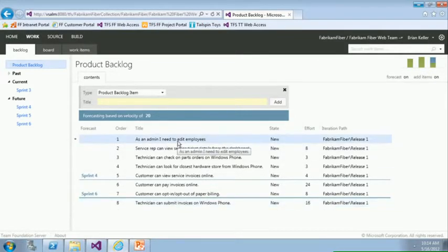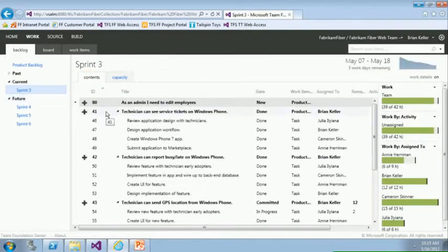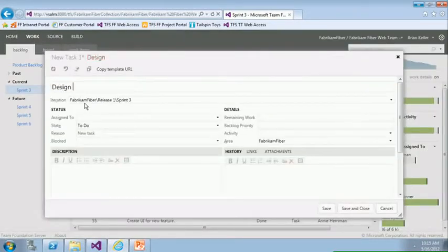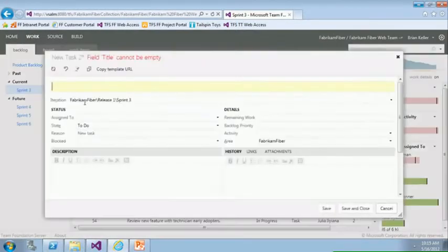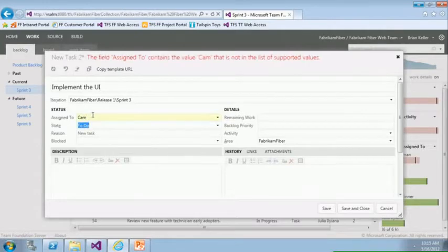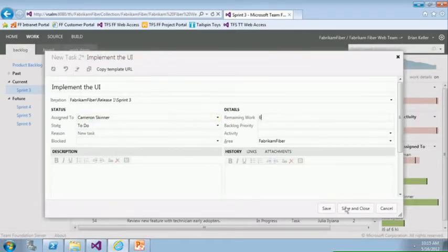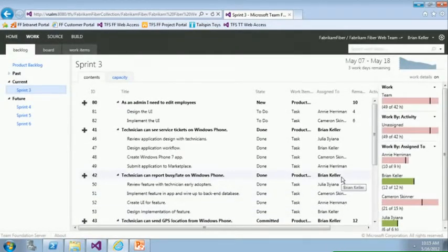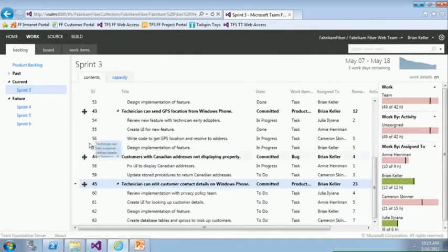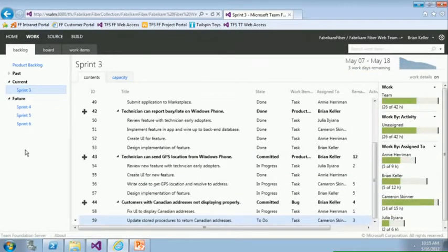I'll do what you're never supposed to do, which is add this to an in-flight sprint. Coming back to this sprint, we can see how individual product backlog items break down into the individual tasks required to do the work. I'll break down this new requirement into two capabilities: one is design the UI — we'll ask Annie to do that, say it will take four hours. The next is to implement the UI — we'll ask Cameron to do that, and let's say it takes him six hours. Right away I see I've pushed my team over capacity. So I'll scroll down and move that lower-priority work item forward to sprint four as a quick adjustment.